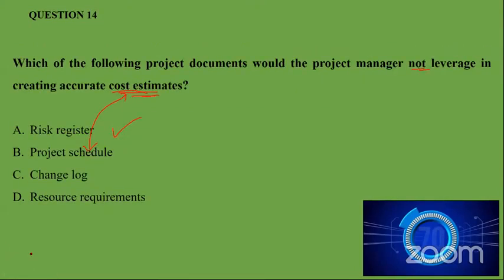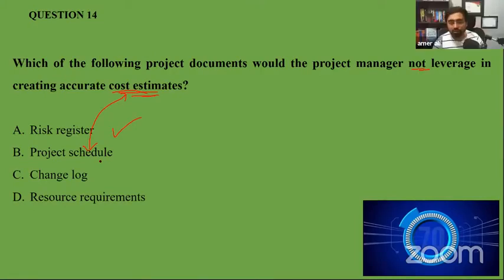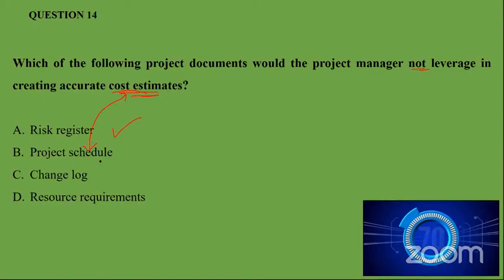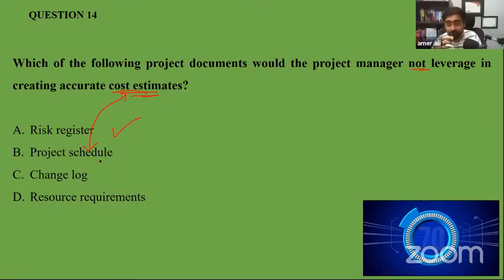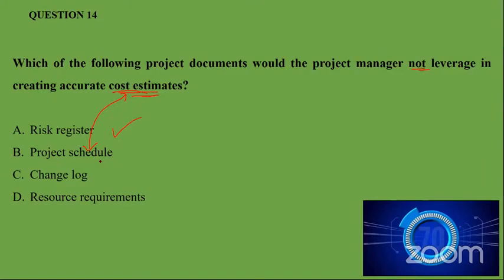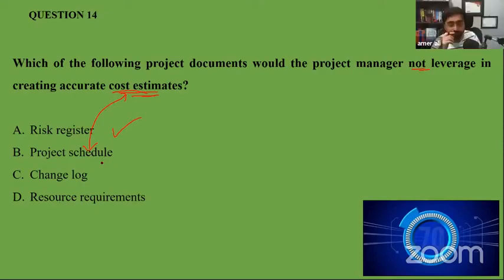During the cost estimate, do we need the change log? Because the risk register is needed, because with the risk we will be doing the contingency plan and contingency reserve, but the change log will be created at a later stage. Yeah, good point. I missed it. The cost estimate we do at the initial or planning stage. Yes, so good point. C can also be the answer.